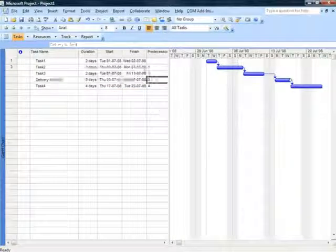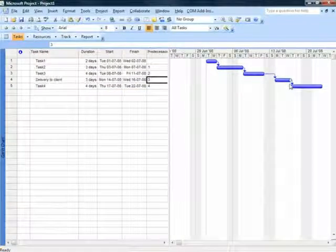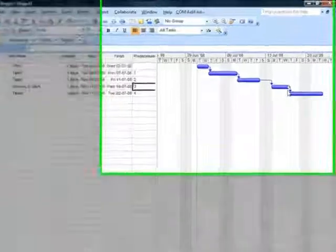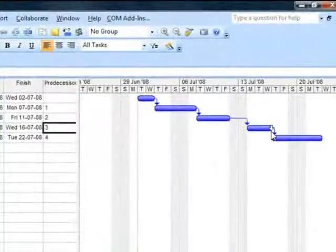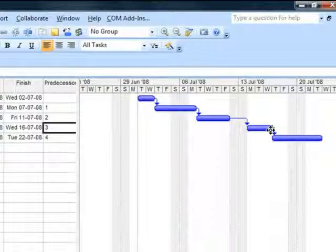You will observe in the Gantt chart that there is a white colored arrow mark. That arrow mark indicates that it is a deadline date.